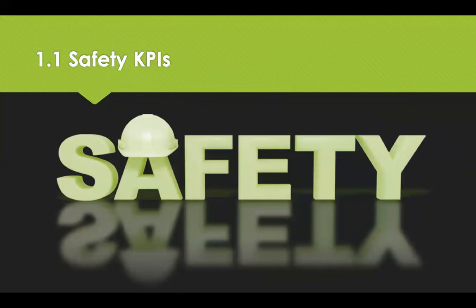Now, safety is a top objective of any company. It's one of the obvious measures of projects and a success in one of the KPIs during the life of a project. A company may be prosecuted and suffer damage to reputation if it fails to maintain an adequate health and safety framework. The measurement of safety can be broken down into different areas such as accident rates, staff safety training, and availability of resources. Examples of these KPIs might include lost time as a result of accidents or accidents avoided.